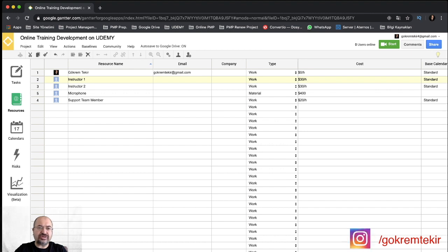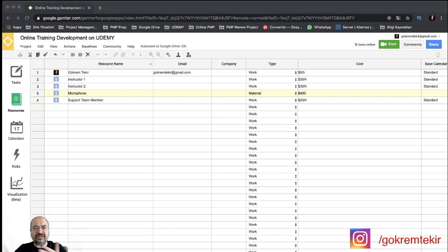The other resource is microphone. We would buy it. It is a kind of material and $400. The support team member who will edit the videos is a work type and will take $20 per hour. Now I will assign these resources to tasks with duration estimates.